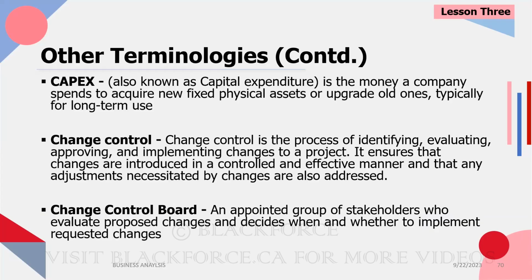Go live is in 1 month. We are not making any changes. If you need a change, submit a ticket. We will track it. Once we go live, the project is stable, we'll begin to review all the changes we need to make. Okay? Who will determine the change fees?